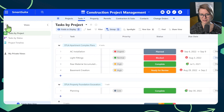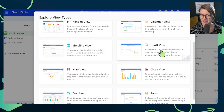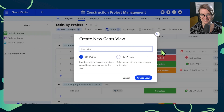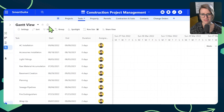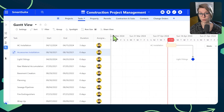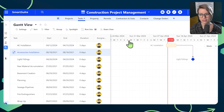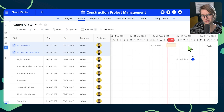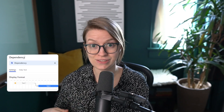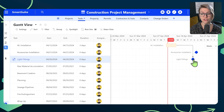To add a Gantt view, I'm going to head over to my sidebar, create a new view, and look for Gantt — two T's, not Nat. Give this a click, give it a name if you want. This Gantt view allows you to view all of your dependency relationships between tasks on one schedule. If I scroll over and adjust some dates, you can see that right here we have our AC installation and our light fittings, and there's this magical arrow that now appears between them, letting us know that the dependency relationship exists. This Gantt view allows you to see that relationship visually and also allows you to create new ones.